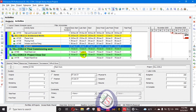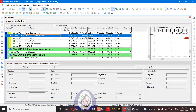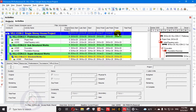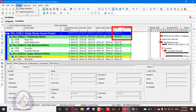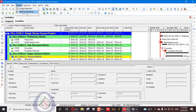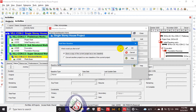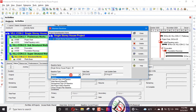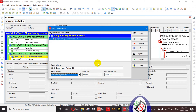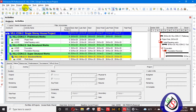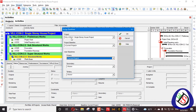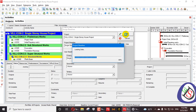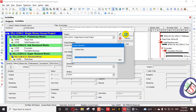Here I will open my Primavera P6 project. I have created some columns and my project finish date is 15th of January 2021. I will go to Maintain Baseline and assign this project as a baseline — initiating the planning baseline. My baseline is now fixed, so I have to monitor my project right now.